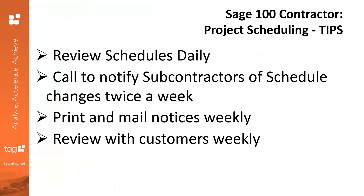Moving on to just a couple of tips recommended by Sage. First, review schedules daily — it's a good idea to review the schedule each day. The duration of a task can change due to a variety of circumstances like weather, supplier delays, or manpower shortages. As those delays occur, extend the duration of the affected tasks, which is easily done by dragging and dropping. You click Mode and then it allows you to resize those tasks. Likewise, if things get completed ahead of time, you can shorten those durations so that everyone is moving on task.